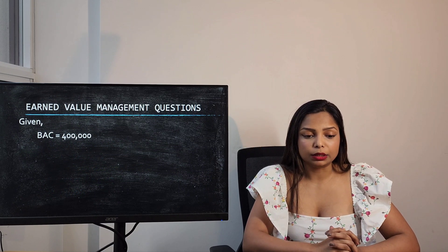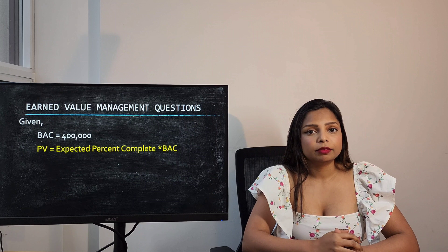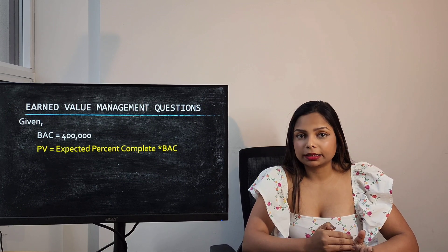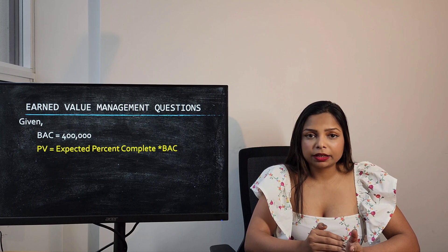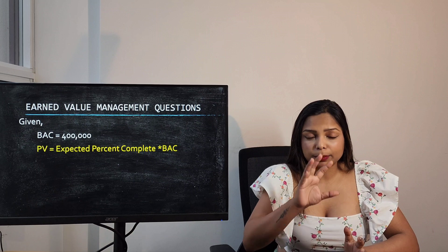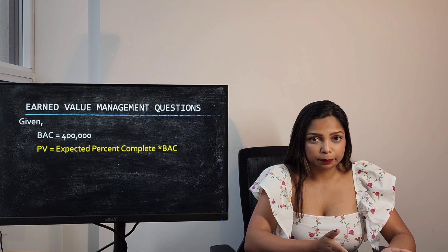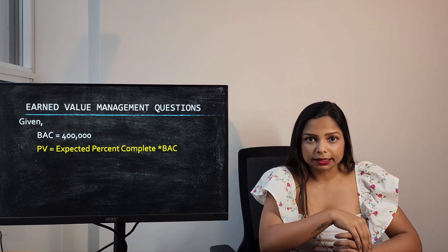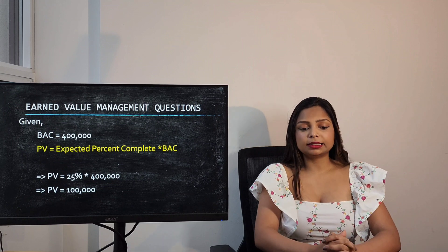The next part is to calculate Planned Value. The formula is expected percent complete multiplied by BAC. The project is supposed to last 12 months with equal work each month, so at month 3 the expected percent complete is 25%. Therefore, Planned Value is 25% multiplied by $400,000, which gives $100,000.